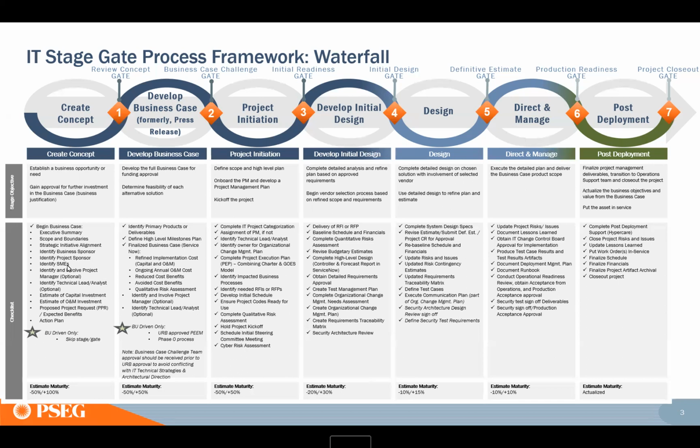So create concept is usually pretty early on, where they're just deciding, does this idea merit us investing in creating a business case? For the business case, you could have a PM, depending on the size and complexity of putting the business case together. Generally, the PM at minimum comes in during project initiation, but may come in during business case depending on the bandwidth of folks like GPMs and tower leads and things like that.